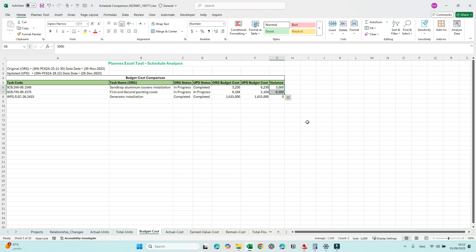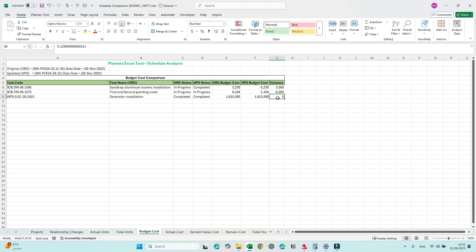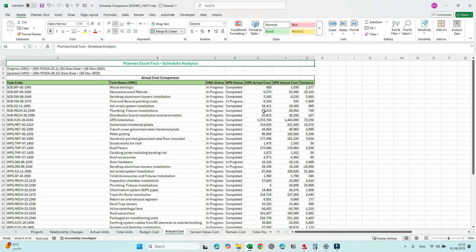The submission is not zero, which might mean budget was reallocated between two activities — this needs justification. Even the decrease in total budget needs to be explained. Some values appear to be zero or very minor decimal differences that we cannot see clearly.